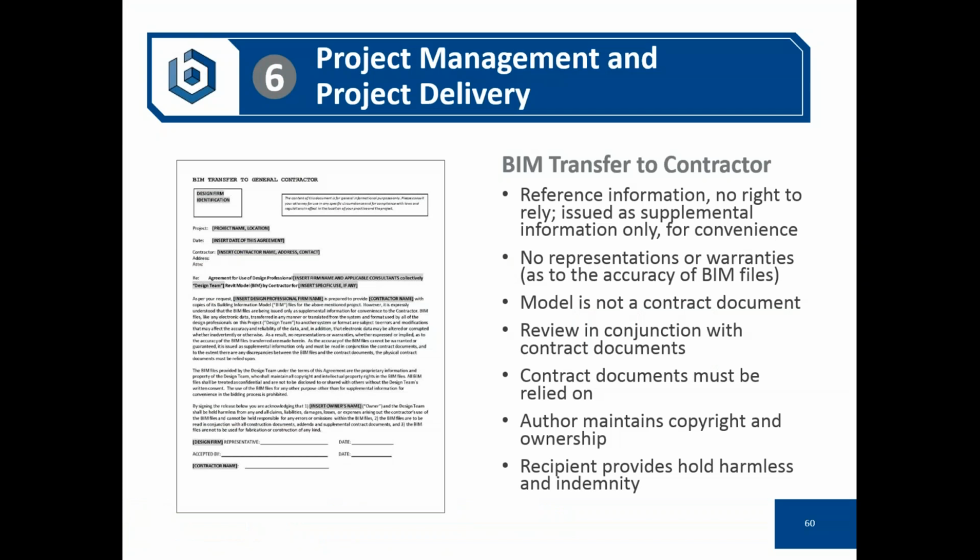And we've also provided a very simple BIM transfer form to the general contractor, which lets them utilize the BIM for reference information only. We particularly studied in the 2017 documents whether to elevate BIM to the level of a contract document. We did not, because the industry is not ready for it yet. Will the industry be ready in 5 years, 10 years? Maybe, but for now it's supplemental information.